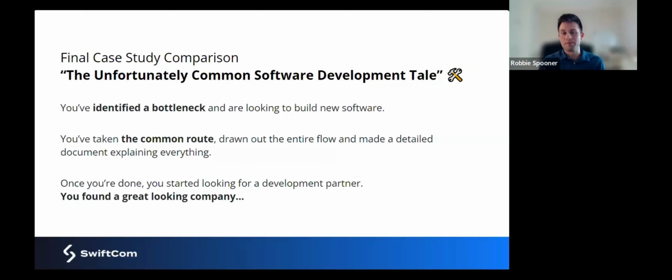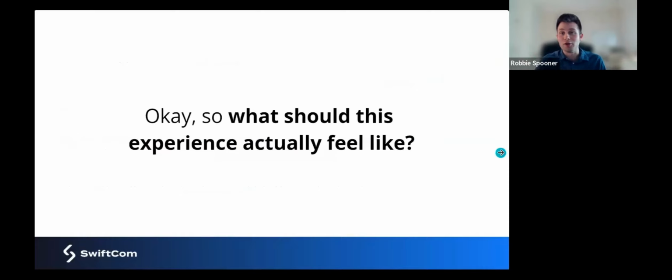On the flip side, what you should actually be getting, at least in our mind and from our experiences, once you've identified the bottleneck, you're going to the person that you trust, you're workshopping things together, you're diagnosing this together, you're getting someone from outside the bottle to help you read the label. You shouldn't be paying these huge upfront deposits. In our mind and our operation, you're paying per sprint. There should be a constant model of value being delivered in these 2 week increments.